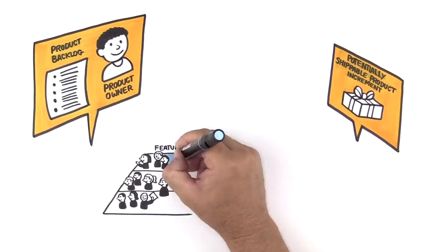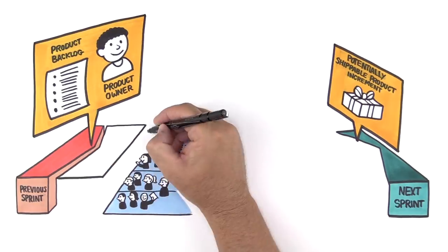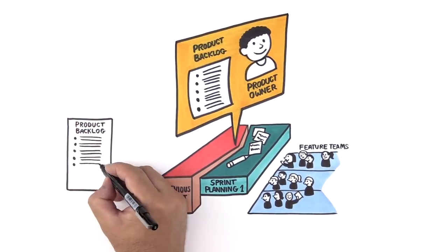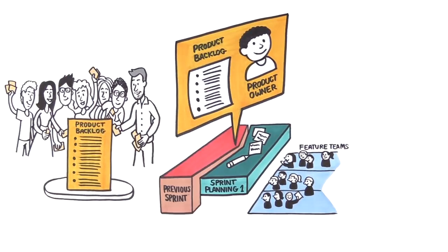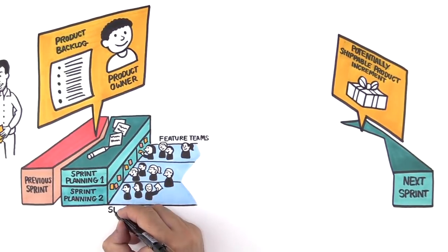Development is iterative and incremental. Each sprint starts with Sprint Planning One, a short shared event where each team selects features from the top of the product backlog that they will implement during the sprint. That's followed by Sprint Planning Two, where the teams discuss their strategies for developing their features during the sprint.